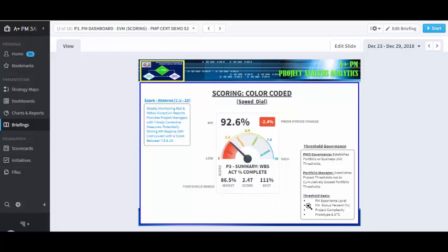So who establishes the thresholds? Well, PMO governance would establish the thresholds for the portfolio. The portfolio manager would be responsible for establishing the threshold for projects, right? And the threshold basis would, in that case, would be PM experience level, right? Whether that person has just been onboarded, learning your systems, etc., right? PM bonus structure, right? Project complexity, or prototype driving towards an estimate to complete, right? So let's go to the next slide here.